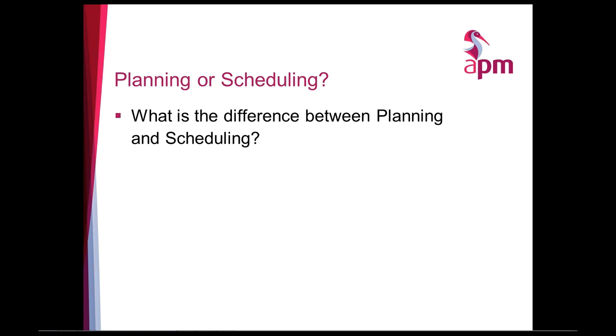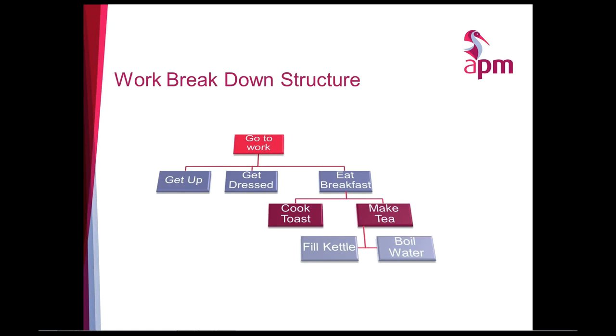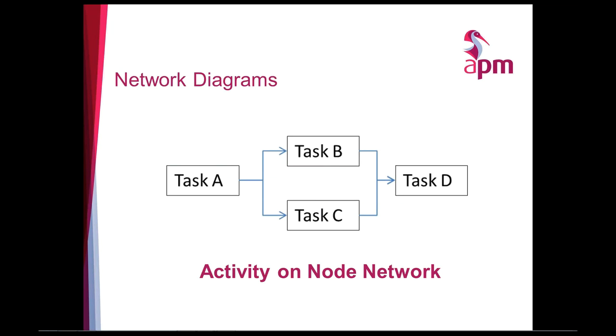Yeah, okay. One of the tools they use, and I was just going to show a quick picture of this, is a work breakdown structure. And this is an example I'll be using throughout the presentation, which we're all familiar with: getting up in the morning, getting dressed and eating breakfast. You can see there are different levels to the work breakdown structure, and each of those legs break down the activities into more and more detail. Your detail at the bottom is the lowest level, and those are normally what we refer to as work packages. Today's presentation we're focusing on scheduling, so what I want to cover now is network diagrams.